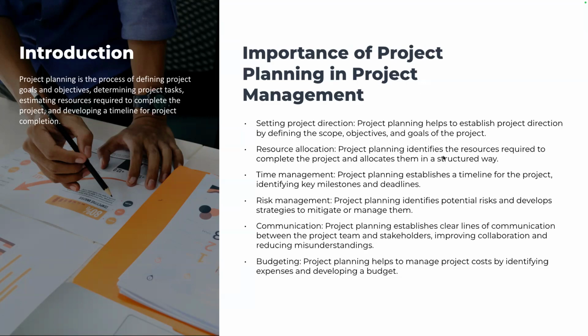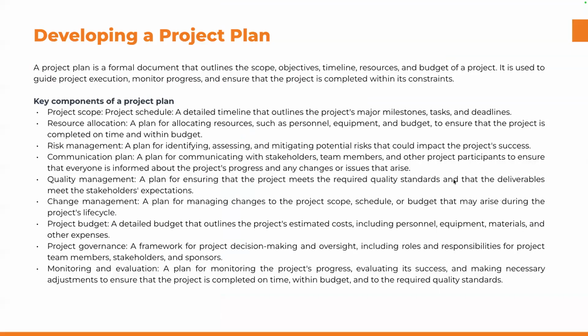So the plan in itself helps us cover resource allocation as well, time management, risk management, communication, budgeting. So obviously you can imagine if you have put a deliverable in your plan, and you've put that somebody's going to be responsible for doing that, right? And that somebody obviously is going to get paid. So you should be able to say, okay, from what we have in the plan, this is how much it's going to cost us, because these are the activities that are going to be delivered.